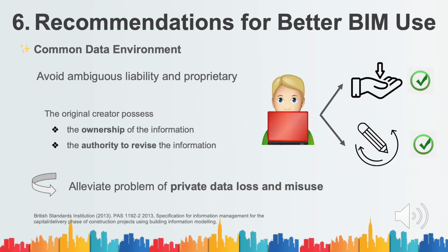Another value added is that the ownership of data is also clarified to prevent ambiguous liability and proprietary, since the original creator possesses the ownership of the information and the authority to revise it. It signifies that the original creator's liabilities will rarely be altered in spite of the incorporation of their model into the synergetic model.